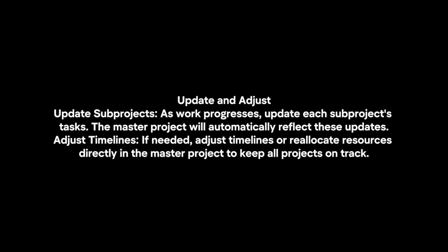Update and adjust. Update sub-projects. As work progresses, update each sub-project's tasks. The master project will automatically reflect these updates. Adjust timelines. If needed, adjust timelines or reallocate resources directly in the master project to keep all projects on track.